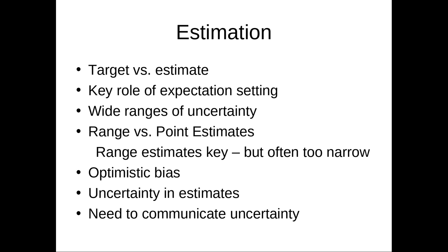So that's one common problem. It doesn't communicate uncertainty. What's another common problem that point estimates have? People always estimate a time that is much less than they actually did. Yeah, exactly. They underestimate. They think they'll finish it sooner than it actually takes. Huge problem. Taken as a promise usually. Yeah, often it's interpreted as a promise. Oh, okay, you'll get it done by then. Okay, great. We'll put that in our schedule for the cut over to the new system. You know, you'll do it by December 15th, right? December 20th, 2 p.m.